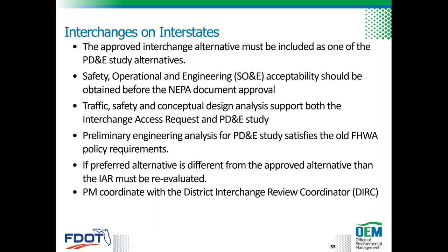The traffic operational analysis, safety analysis, and conceptual design analysis performed to address the requirements of FHWA policies on access to interstate system also support the development and evaluation of alternatives in the PD&E study. The preliminary engineering analysis for the PD&E study satisfies the old FHWA policy requirements. These are the ones that relate to social, economic, and environmental impacts that are no longer addressed in the IAR document.